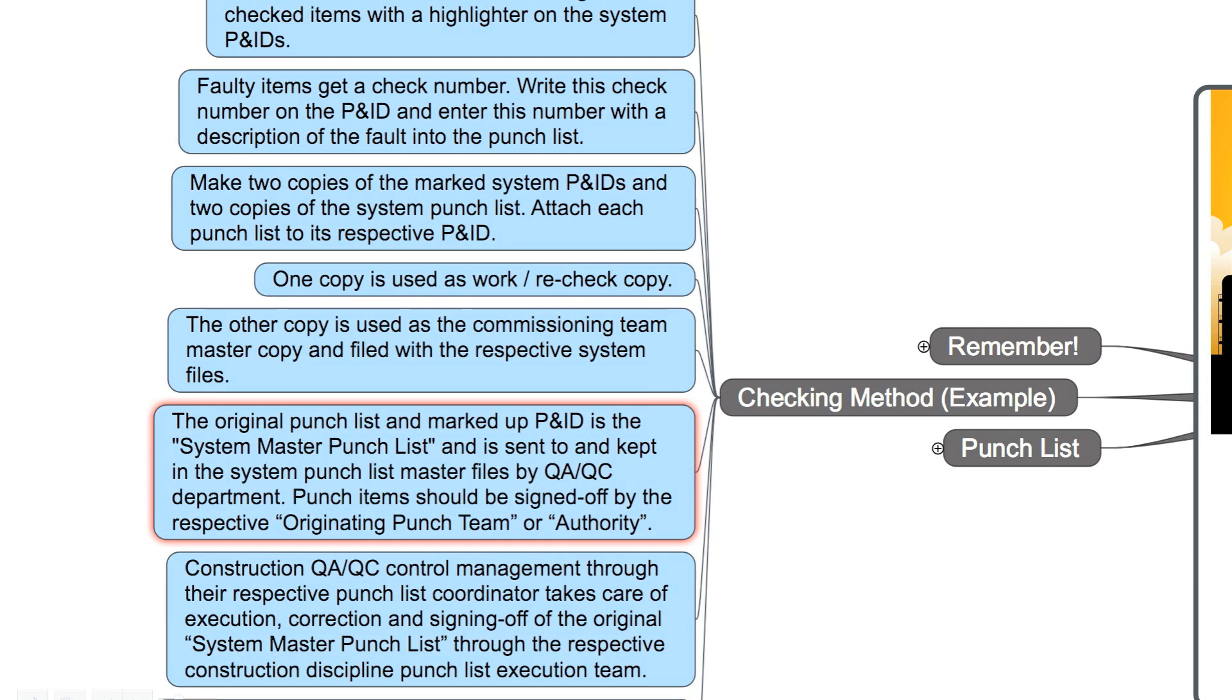The original punch list and marked up P&ID is the system master punch list and is sent to and kept in the system punch list master files by QA/QC department. Punch items should be signed off by the respective originating punch team or authority.